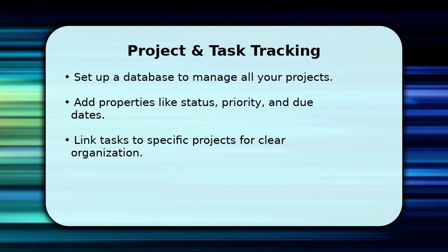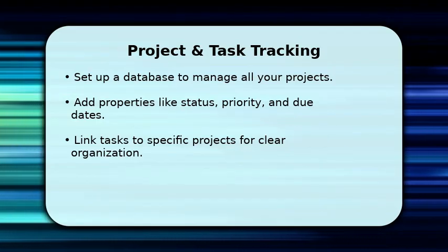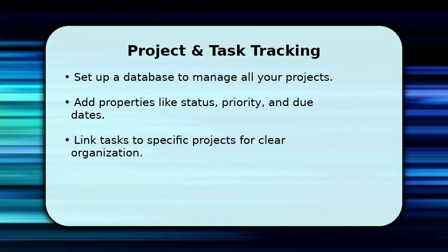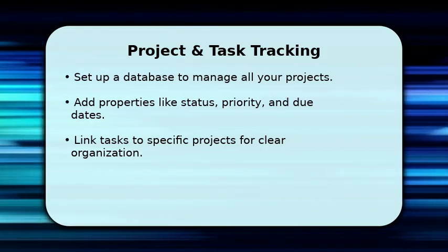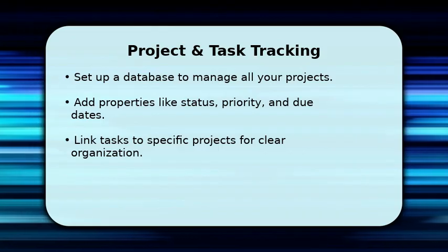Next, let's organize your development projects. Create a database to track all your projects and tasks. Add essential properties such as status, priority, and due date to keep everything organized. You can then link individual tasks to their respective projects, providing a clear overview of your workload and ensuring no detail is missed. This structure is crucial for efficient project management.